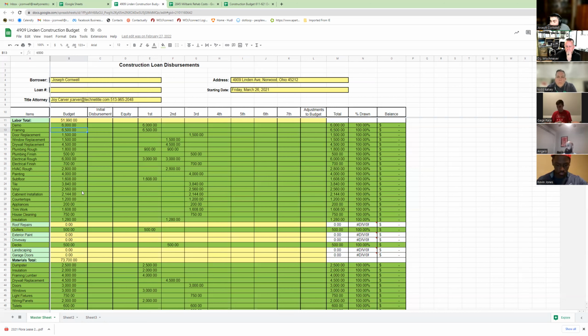If you're doing a ton of them, like let's say you have to do 100, you're probably going to get a lot better price. You might get them down to $300 to $350, $400 a window. They're going to take a lot less margin on a really big deal. And if you're looking at retail windows, like Champion or something, you're talking like 800 a window. Now, I wouldn't pay that high, but people do. Yeah, I just got quoted $1,000 a window for something that looks like that right there. Yeah, like 2 days ago.